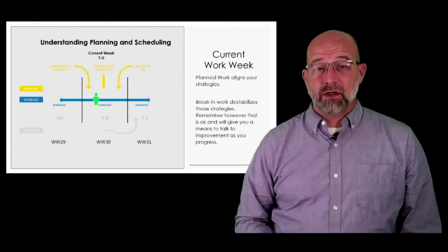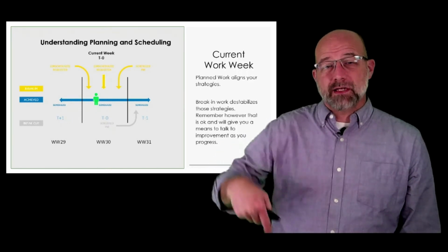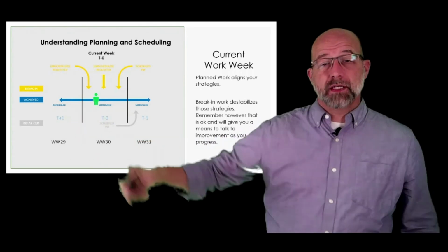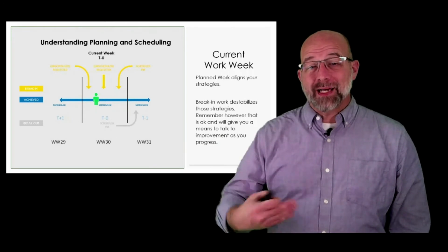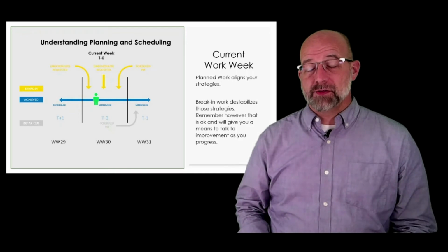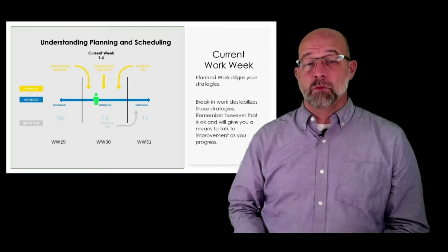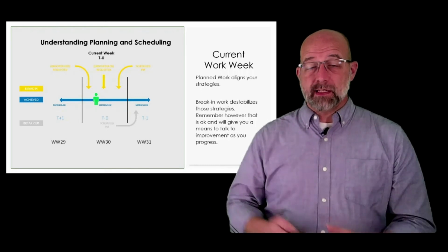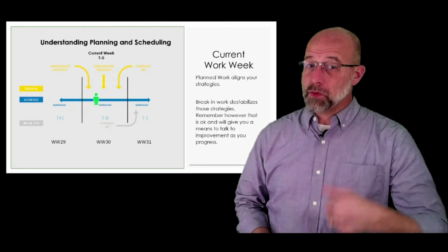Now, you could also have some stuff that's called breakout work, where I had something scheduled this week, but I broke it out of the schedule, possibly because of the break-ins, and I put it into a forecasted work week, but I did not reschedule it. We want to get away from this practice so that we identify things and get rid of the backlog or bring it down to a more manageable range and support the service level agreements with the end users. Now, remember what I said.